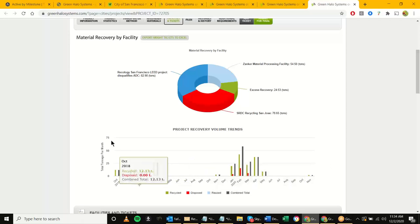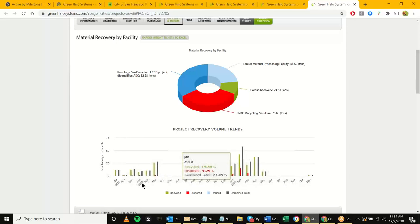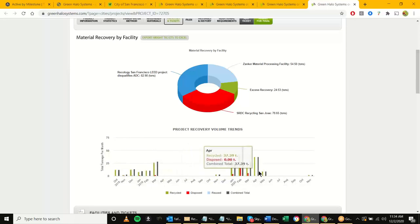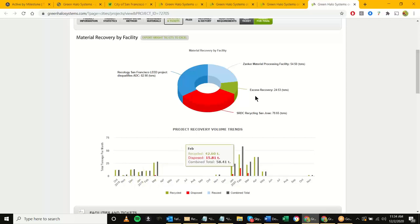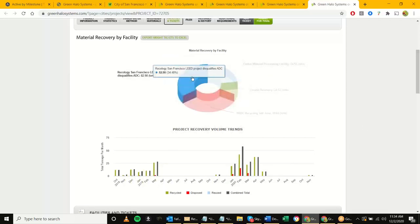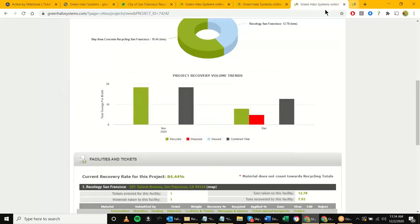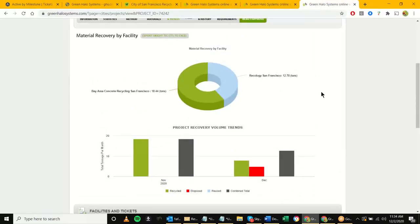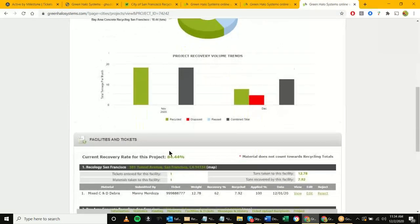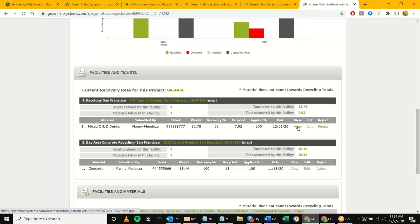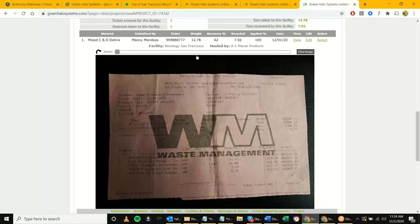Some projects trend with activity in January, February, March, then no reporting for other months. The pie graphs will show more colors for different materials and facilities being tracked. For a project with maybe 20 to 30 tickets, you can view them by clicking 'View' and checking that the ticket number matches what was inputted, the weight matches, the dates match, and the city of origin. This is how you verify compliance — how you basically verify this ticket belongs to the project.